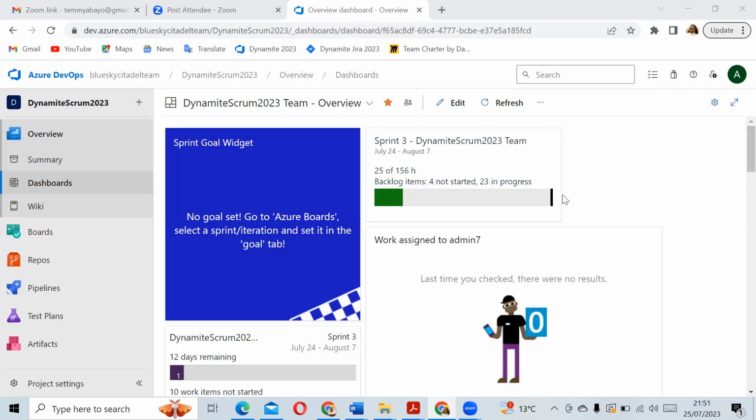And what that is saying is that you are overestimating your tasks. Okay, so your 156 hours stops where that black line is. And like I said, if they start estimating all their stories and it goes beyond 156, that green bar is going to turn red. And that should tell you as the Scrum Master, if you're monitoring your dashboard, that they've overestimated.